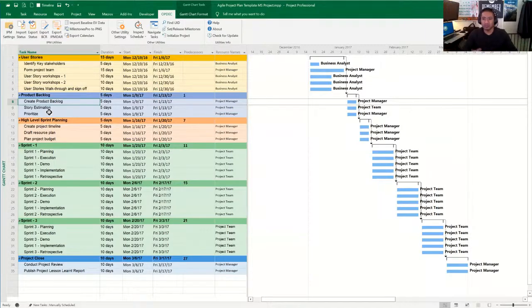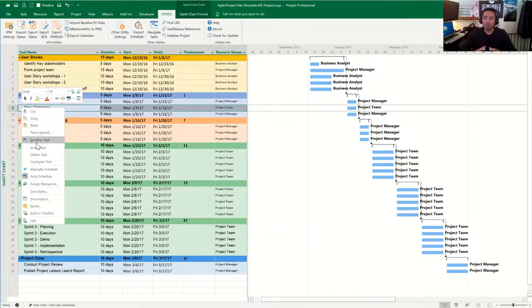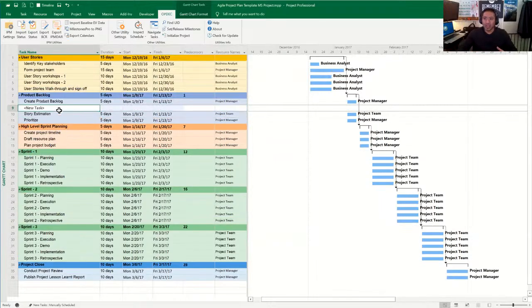All the uncertainties come into play. So how I would do it, and you're more than welcome to apply this as well, my technique, and it's been beneficial, is adding a subtask, which helps with separating the logic between it. So adding a subtask in here, and then just adding delay